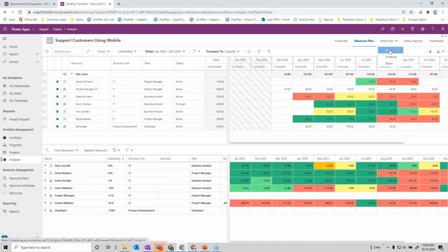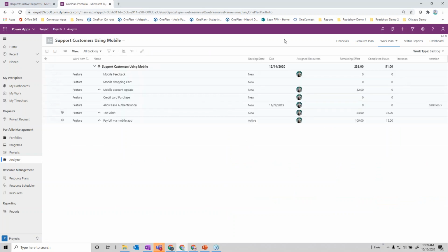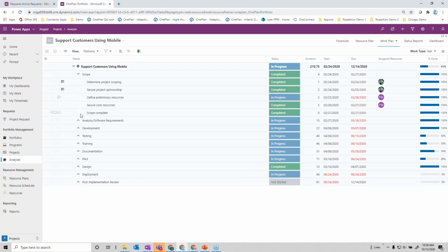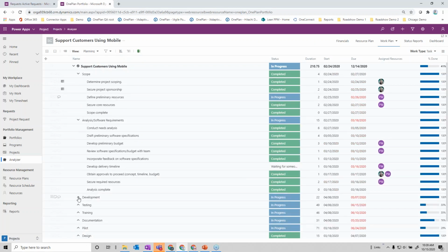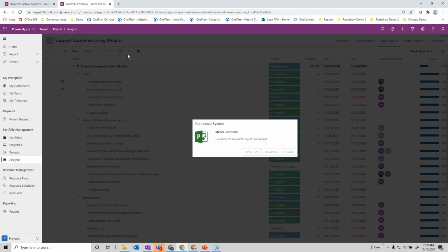And then we have the ability to do work plans. In these work plans, we have the ability to do a variety of things. So for example, I talked about this being connected to Microsoft Project for a traditional project plan. This waterfall plan may be the mode that leadership wants to see for commitments and traditional things like milestones, delivery dates and phases. And you may build that right here in one plan or use a connection to a Microsoft Project plan.